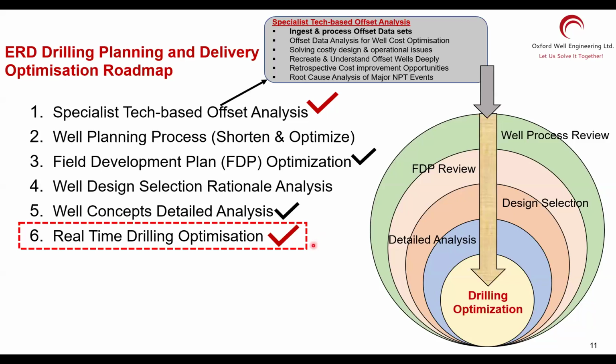At the very end of the journey, when you are ready to drill, use the real-time drilling optimization technology, but the right one, not just monitoring for pits and well control. You want to do the proper drilling optimization, weight transfer, torque monitoring, drilling efficiencies, and things like that. I'm not talking about just looking at the pits like mud loggers, which is also fine.